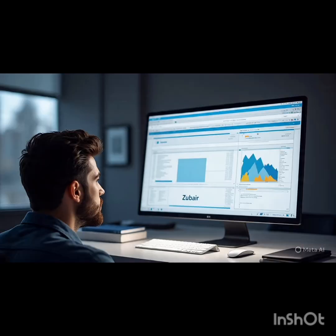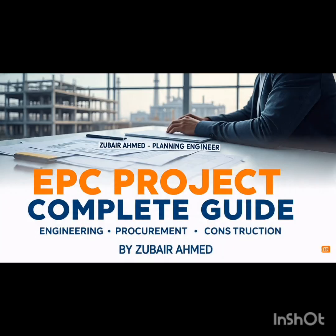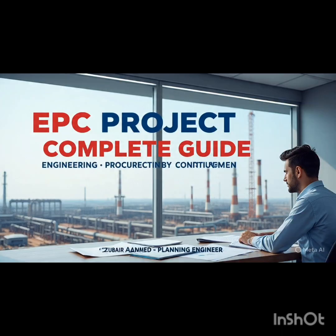Right. Then you launch into detailed engineering. This is the marathon phase. It can take 18 to 30 months, easily. And costs a lot more. Significantly more. Maybe 8 to 12% of the total project cost goes just into detailed design. This is where all the final P&IDs, the 3D models, the structural plans, everything gets finalized.